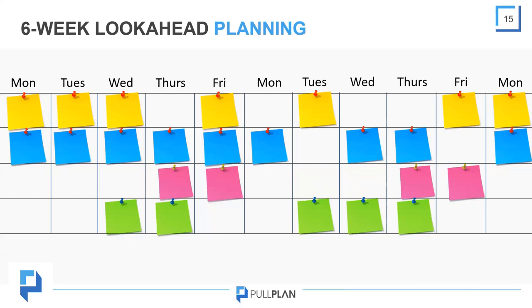The look-ahead view also provides the team with a great short-term insight into their resource requirements. Where there are days where no work is being completed, where it makes sense, other work may be resequenced to fill in the gaps. This may include cleanup of punch items or even testing work.